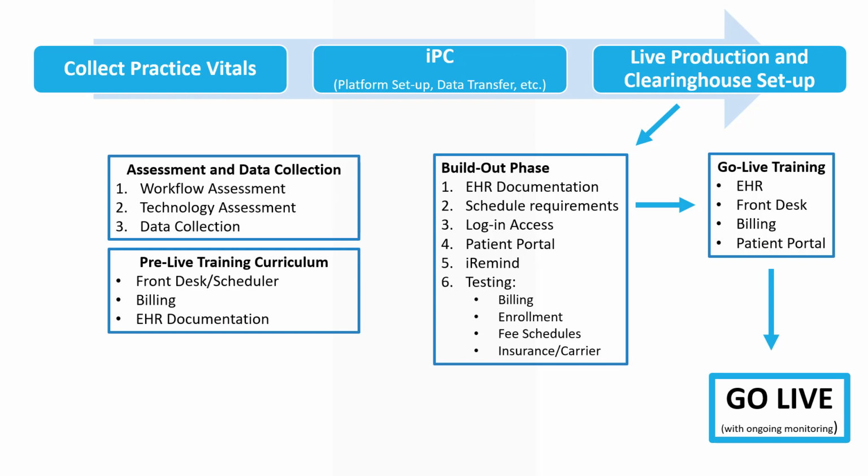We also build out those scheduler requirements and make sure that everybody is able to log into the platform. Then we finalize the patient portal, the text and appointment reminder system called iRemind, and any further testing in billing, enrollment, fee schedules, and insurance carriers. So that build out phase is where we get everything assembled, customized, and then tested.